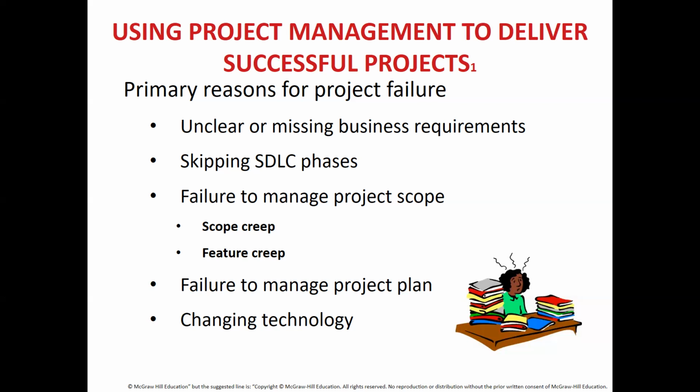You make a website, and together with that, you feed in a booking engine and a payment engine. A booking engine is where you do the bookings, like on hotel websites. A payment engine is where you process the payment. What the project manager, or the project leader, would do is say, yeah, I can do that, provided you feed in close to another 20 grand. So that's scope creep, when the scope increases.